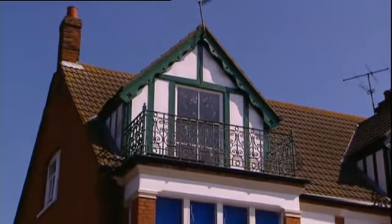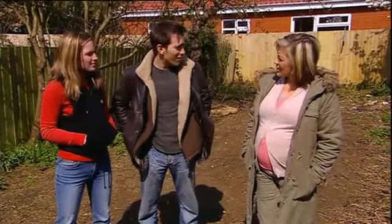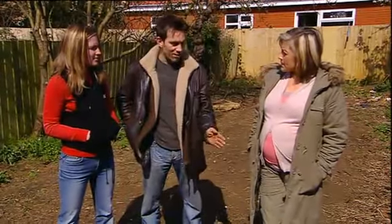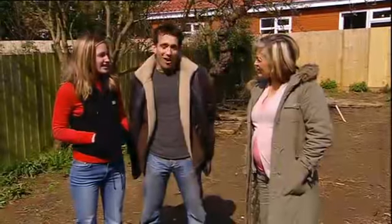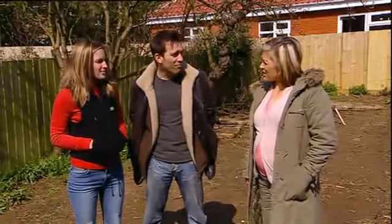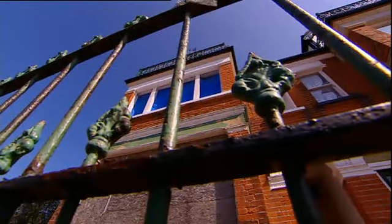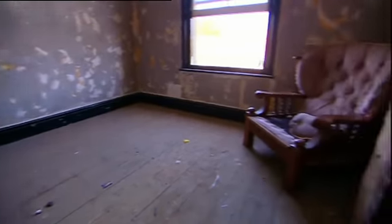Bit ambitious, you reckon? Yeah. Do you have a contingency for spending more? I've got about 1,000 and then a credit card. So I've literally worked out what money I can get hold of, and then I've allocated that's what I've got for that, that's what I've got for the kitchen, that's what I've got for the bathroom. I can't go over that. What do you plan on selling it for? Hopefully, I'd like to think I'll get about 215 for it. So that would leave you £40,000 profit? Yeah. But it would take a minor miracle to turn this around for £18,000, especially as £6,000 of that's already allocated for their mortgage payments and fees.